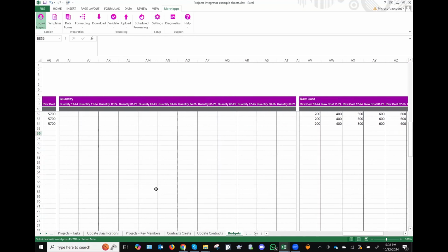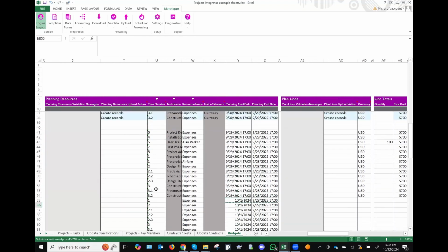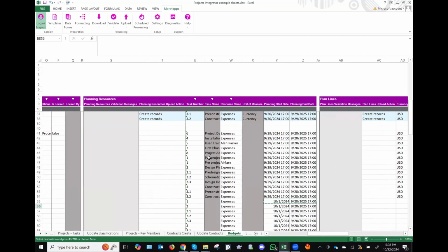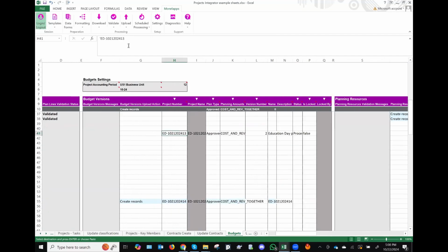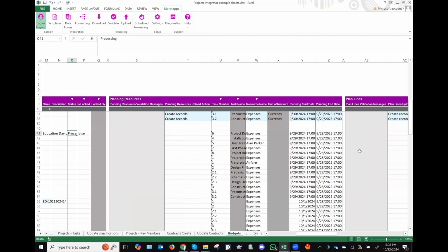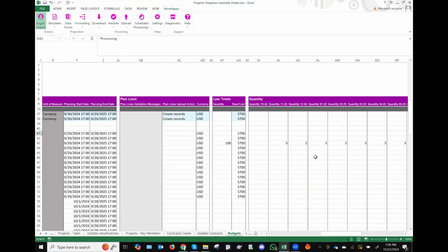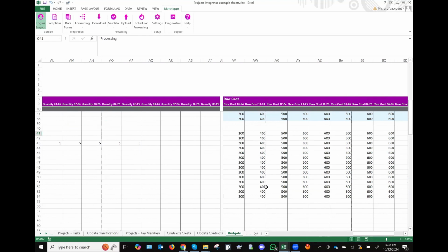You can also recycle. For example, it's going to be repetitive. You have already got these for one project. You can just use the same and recycle this for project number 14. If it's going to be a replica, you have a lot of similar CapEx budgets. You can just generate a new version for the same one. If you take off the version number, you can also baseline it from here as soon as you put the status as baseline. And you can also copy and paste from any external sheet. So many times you're handed your amounts in a table fashion. You can just take that and paste it here.